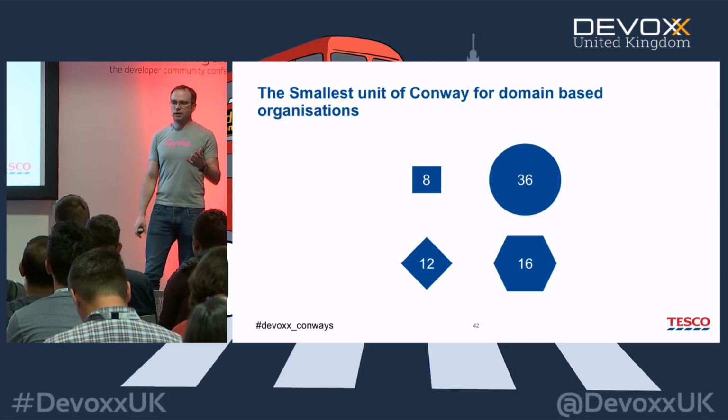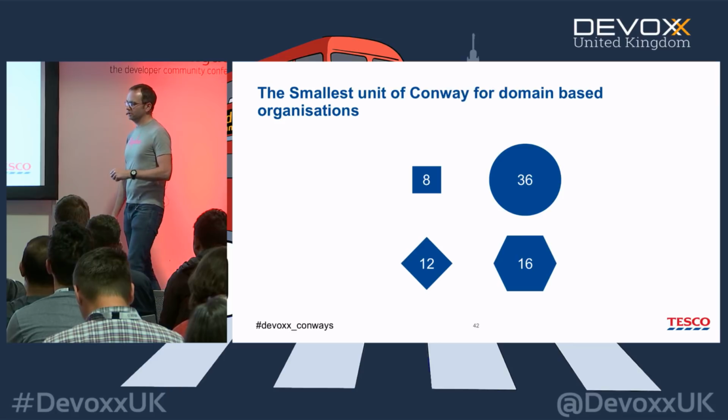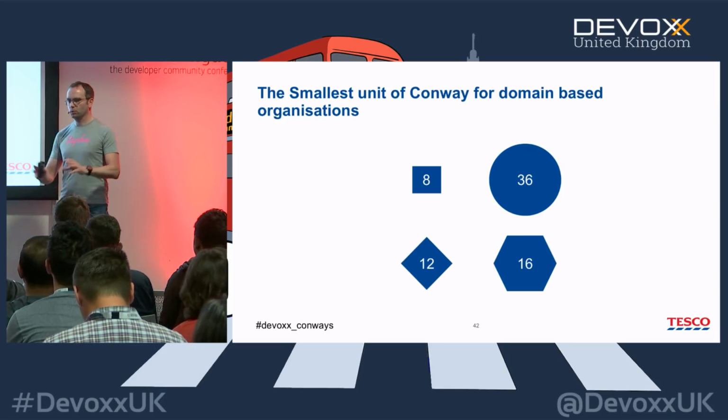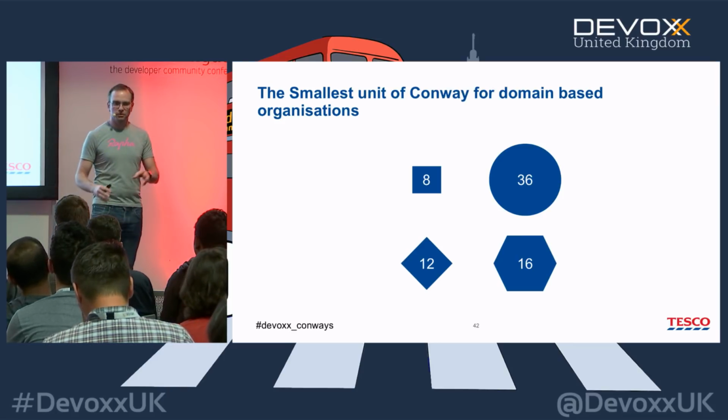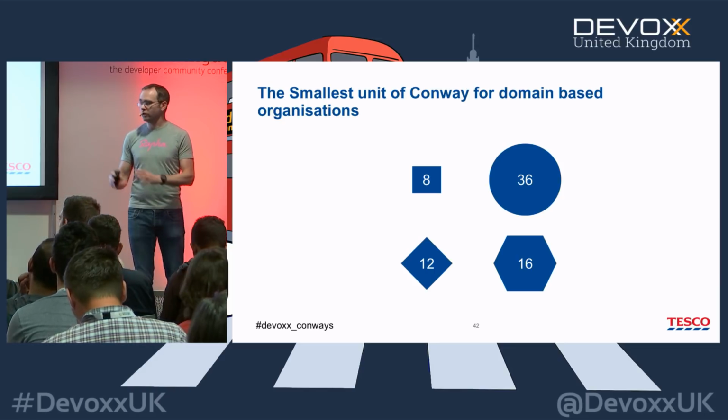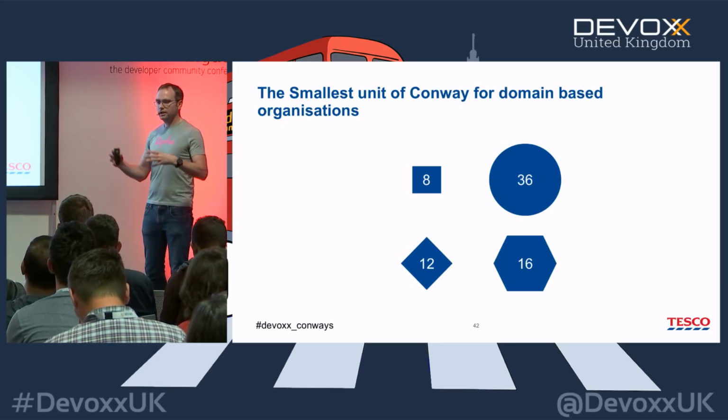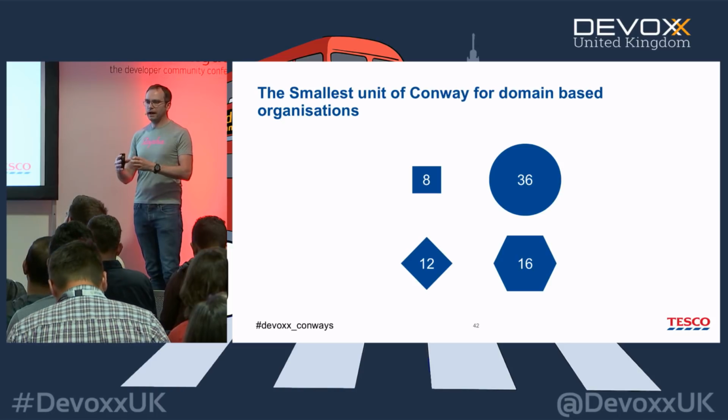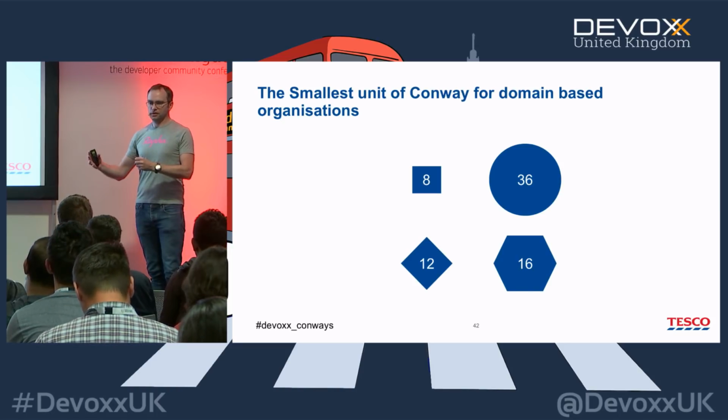And it's kind of similar to how we do user stories, right? Oh, this 20-point story, we don't accept 20-point stories, they're too large. We won't accept it until we break it up into some nice, roughly five-point stories. And we try to do that with our services. Get them as small as they can be without forcing ourselves to have new problems.